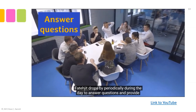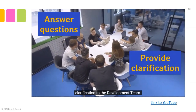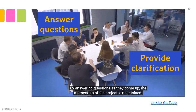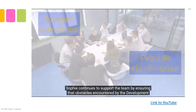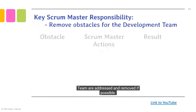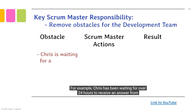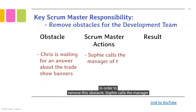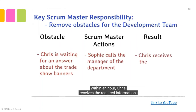Fadijit drops by periodically during the day to answer questions and provide clarification to the development team, maintaining the momentum of the project. Sophie continues to support the team by ensuring that obstacles are addressed and removed if possible. For example, Chris has been waiting over 24 hours for an answer from the supply chain and logistics department regarding the trade show banners. To remove this obstacle, Sophie calls the department manager, and within an hour Chris receives the required information.